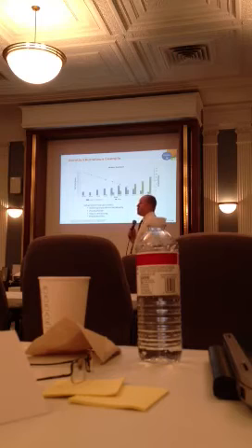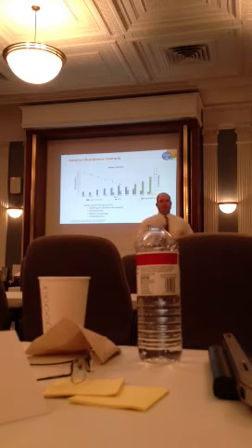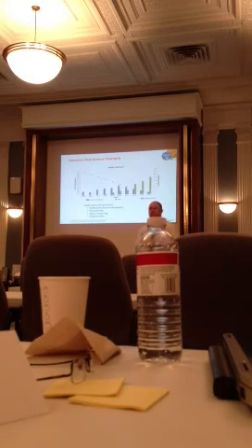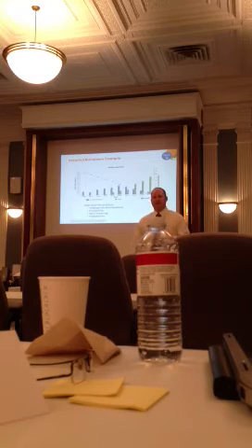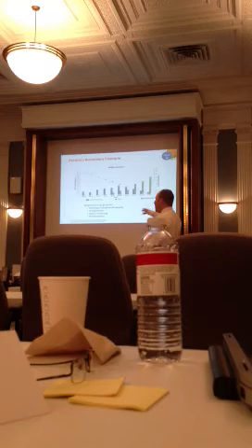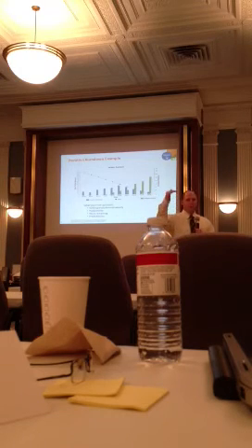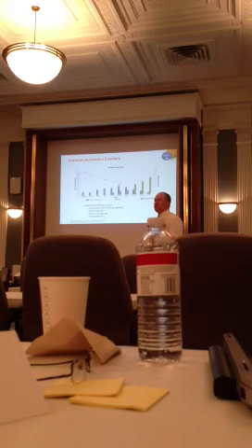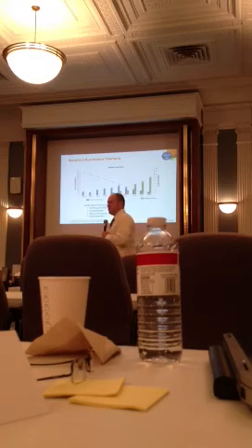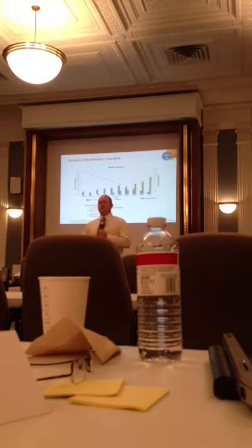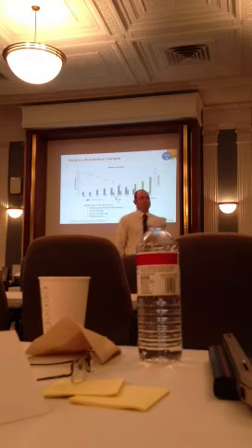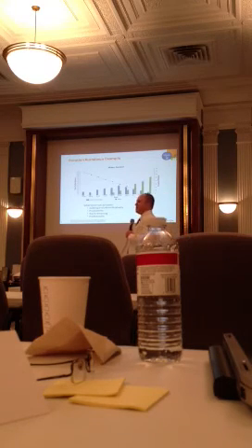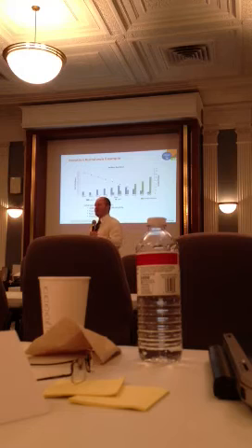So we have 20 hours worth of work that's probably going to carry over. Last time I committed to 78 story points. That's too high. I'm going to drop that 78 to maybe 70. 70 is probably what we would have gotten acceptance on had we structured this right, is my guess. On top of that, we have 20 hours worth of work carrying over. Maybe that's another 5 story points. So if I'm thinking about what I'm going to let my team commit to in the next iteration, maybe 65, somewhere in that range.